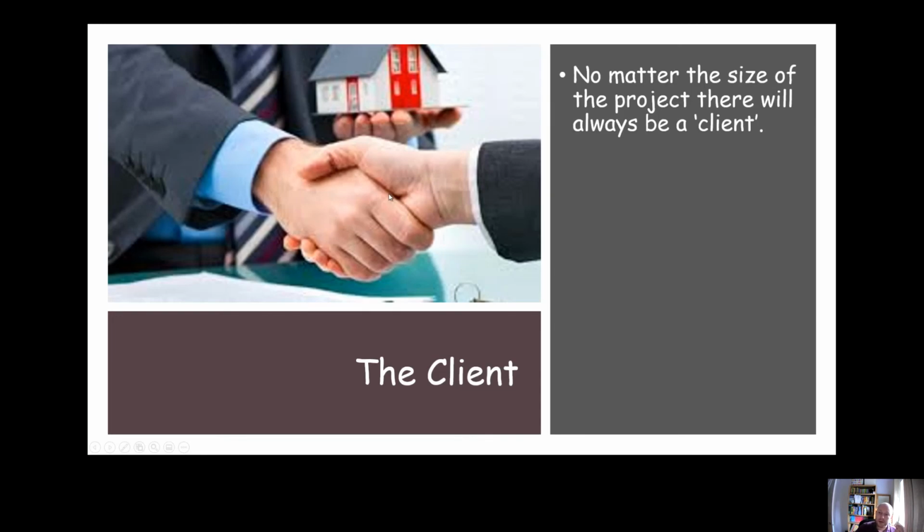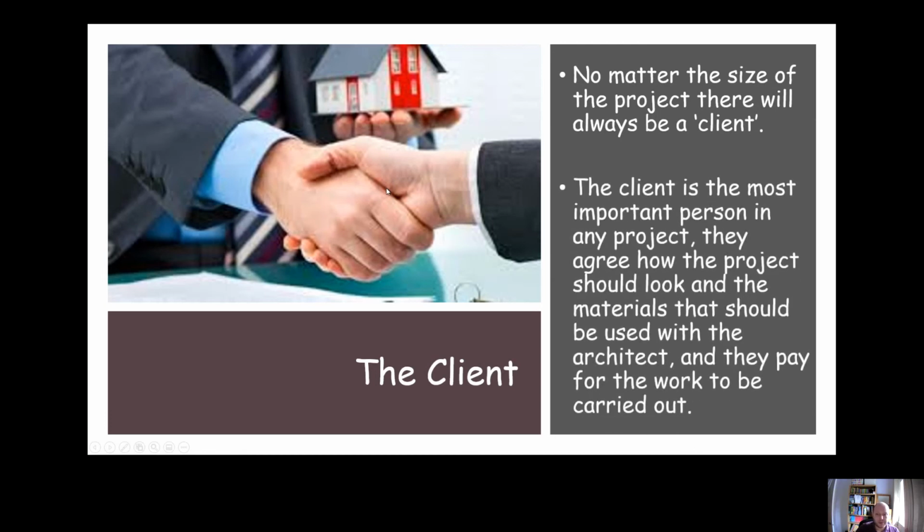But no matter the size of the project, there will always be a client. The client is the person who pays for the project, so therefore the client has got overall responsibility for the project. And under the CDM regs, it's actually the client's responsibility to make sure that they bring in an appropriate main contractor.